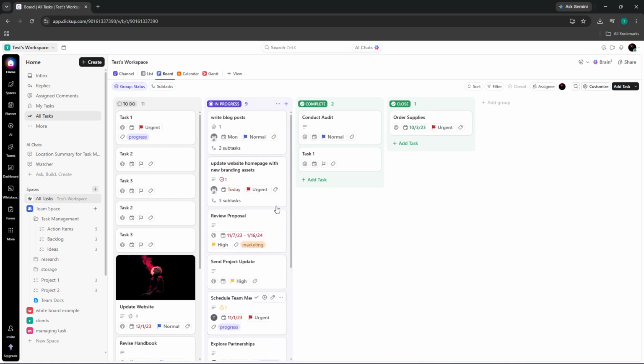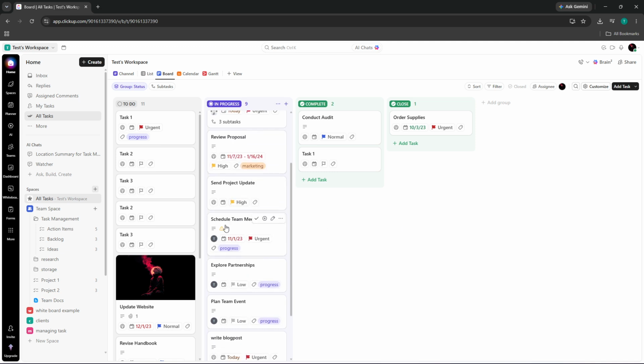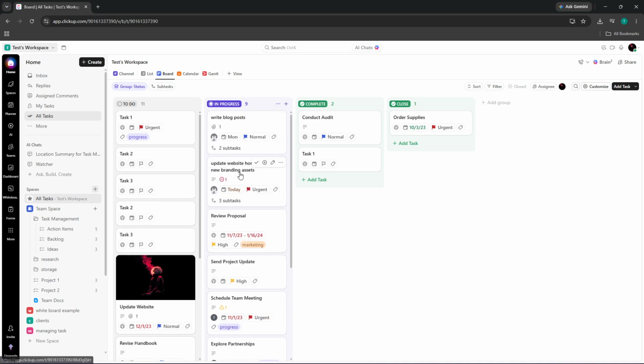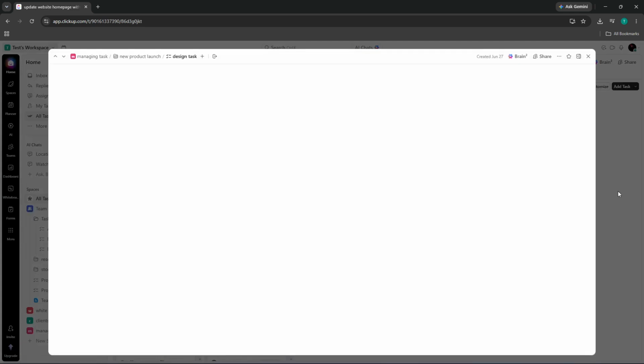If the default fields on a task card aren't enough for your workflow, you can add custom fields, things like budget, client name, or effort estimate. These fields appear right on the card, so you never have to open a task just to check a key piece of information. As work progresses, make a habit of reviewing the board regularly. The movement of cards across columns is your real-time progress report, and spotting a card that hasn't moved in several days is your cue to check in or reassign.